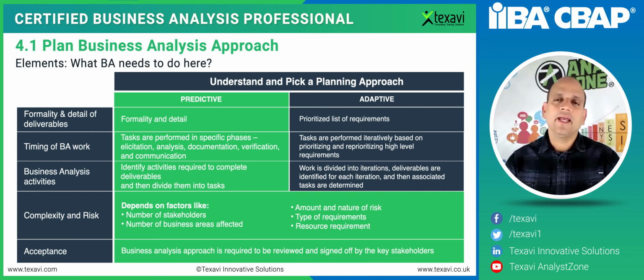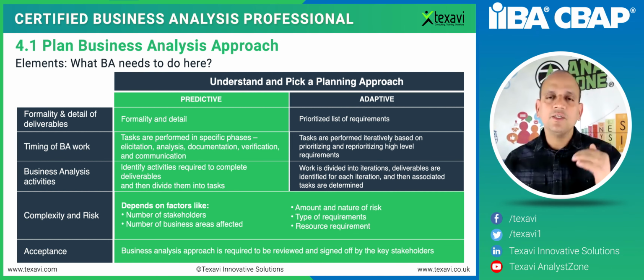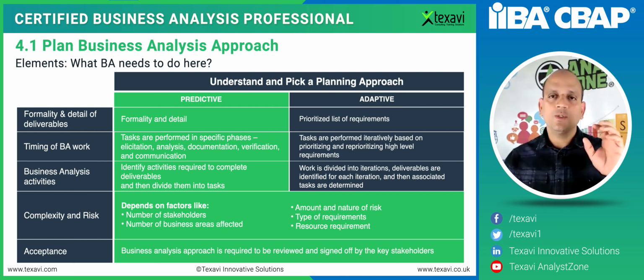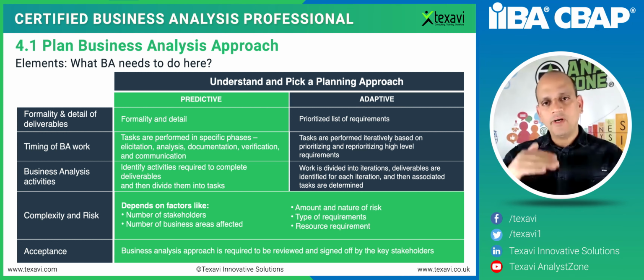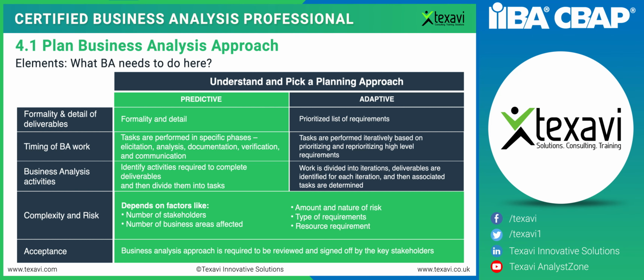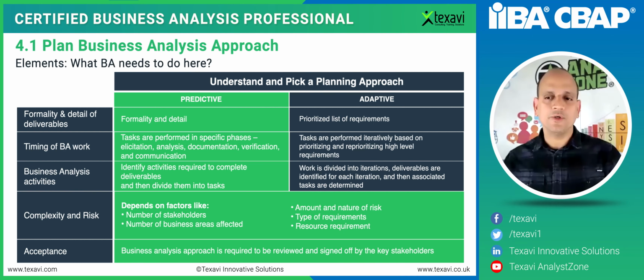So the backlog gets prioritized. There's a product backlog, which is maintained by the product owner, that gets continuously updated with the requirements, the tasks, features, defects, fixes, and change requests. All of that is put into the backlog, and then gets prioritized depending on importance and urgency. We talked about prioritization aspects as well, right? We talked about the MoSCoW tool that can help you prioritize in terms of must-haves, should have, could have, and will not have this time.